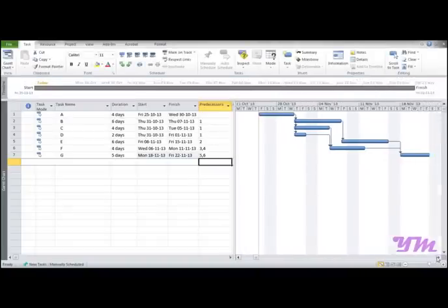So now if we want to look further, yes, we know that activity B is after activity A. So if we look at the relationship, activity B, which is this one, starts once activity A is completed. So the relationship is finish to start, which means after activity A finishes, activity B starts. Now if you want to put some time interval between the finish of the very first activity and the start of the very next activity, that is generally referred to as a lag in project language.